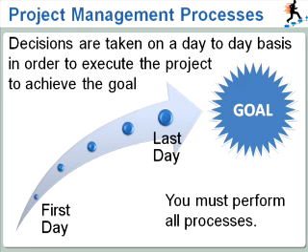You cannot just simply cut out a process here or there just because it looks like you don't need that particular process on the project. Instead, the idea is that the project management team decides how much and to what depth each of the processes will be used. For instance, in many cases it is clear that there is a strong desire that a particular project result will be built in-house without the need for vendors. That doesn't mean that you can simply cut out project procurement management.